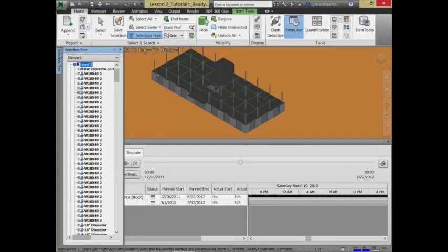So where I think about things in terms of whether those are girders or columns, it doesn't necessarily register for me, and I have a hard time mapping those things in. So what I tend to do, rather than choosing things explicitly based on a snapshot of what's here today, is set up search sets where I go through and assign IDs to all the different elements, a task ID, but I actually do it back in Revit.